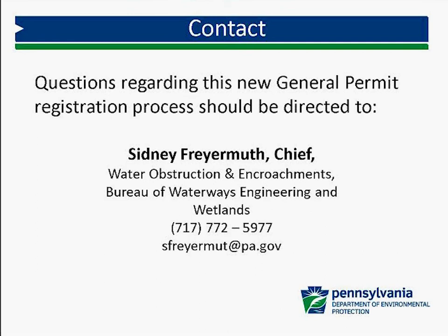Since the fee is no longer required for completeness, does the fee need to be submitted prior to authorization? For general permits, the fee has nothing to do with completeness or eligibility. The fee has to be submitted upon submission of your permit registration. As it's done right now, it becomes a completeness issue, but since the two processes are combined, the fee will be required when submitted.